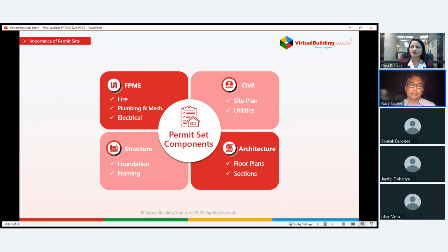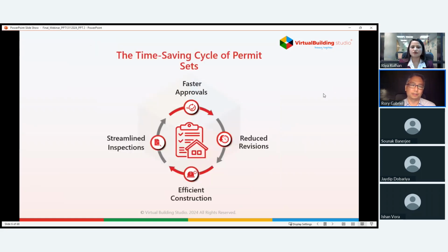All right, so that's the what of a permit set. Now let's talk about why this is such a big deal for project efficiency. If your permit set is solid, everything runs more smoothly and projects stay on track from the start. Why? Because a good set helps us get through approvals faster and with way less hassle. So picture this, you've got projects waiting for permits in cities or counties that are totally swamped. With all the growth and backlog that's been going on, some places are struggling to keep up. Some states have passed laws to speed things up. Arizona, for instance, now requires zoning applications to be deemed complete or incomplete within 30 days. California had similar processes for a while. States like Hawaii, Montana, and Tennessee also streamline approvals.